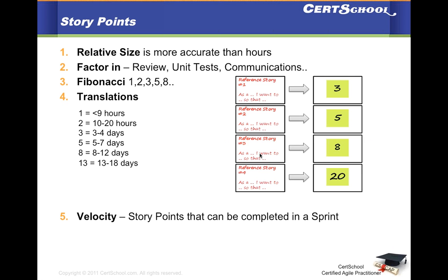You are not trying to estimate the calendar time that it is going to take, or how many resources are going to work on it. When you are creating an estimate, it is just a plain vanilla estimate. It should not be associated with how many people are going to work on it.